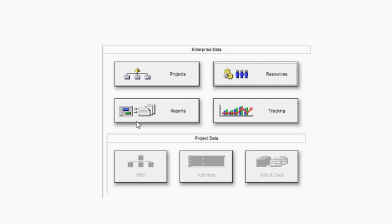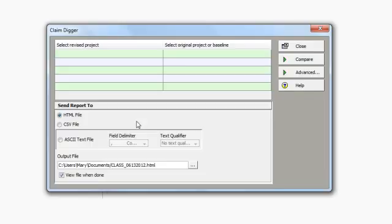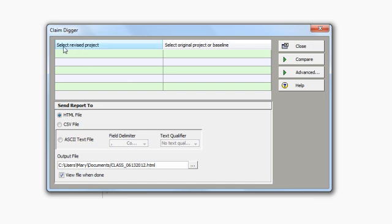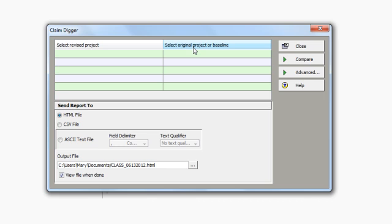Notice I've got two columns. One column is where I can specify the revised project or projects that I would like to compare, and the second column to the right is where I can specify the original project to compare to my revised project, or the baseline I want to compare to the revised project. Each row on this dialog box represents a comparison of two projects.